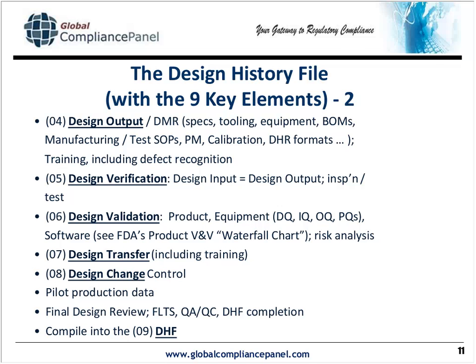And then, of course, all of this, any changes, any modifications, any developmental history is all under design change control. Most companies that are large have their own prototype change control system separate from their GMP compliance change control system. And until the point of design transfer, all these changes are done under their prototype change control system.